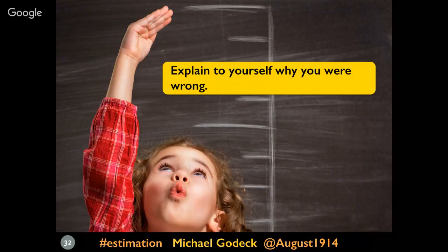This is an exercise where you list out the potential problems you might run into. And in addition to improving your range as a result, the exercise will help you develop a better understanding of the work that you're proposing by exploring the risks and unknowns, right? So you're enumerating the risks and unknowns, and then you adjust your estimate, and based on the risks and unknowns, you can begin to ask questions. And if you could answer those questions, it would change your sense of confidence about where the actual value is going to fall.